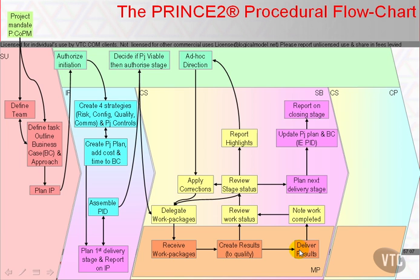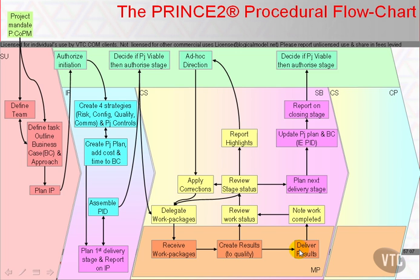All is summarised in an end-stage report, and the whole lot is passed to the project board to decide whether the project remains viable and desirable. If so, then the cycle of delegate, receive, create, deliver, note completion and review stage status restarts, with the project manager taking control of the stage on a day-to-day basis, handing out work packages and noting when they are complete in order to delegate further work packages. When the supply of work packages within the current stage plan is exhausted, starting the plan for the next delivery stage, updating the project plan, reporting on the closing stage, and asking the project board for permission to start again — and so we go around a tight cycle within the stage and a larger cycle for each stage.